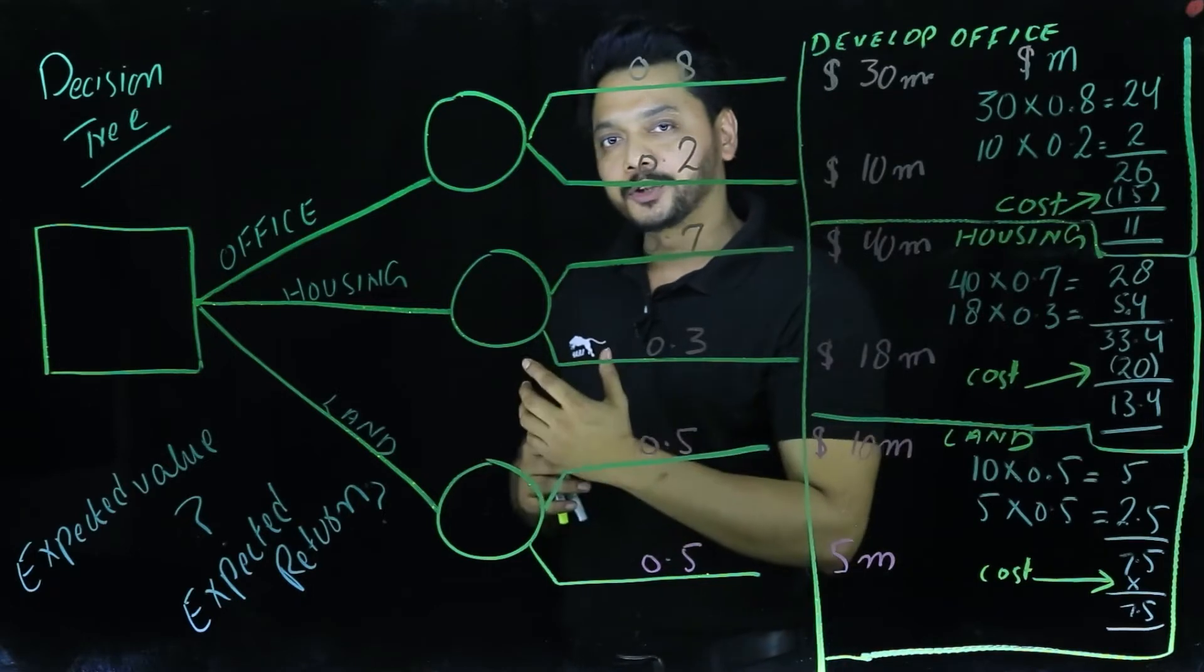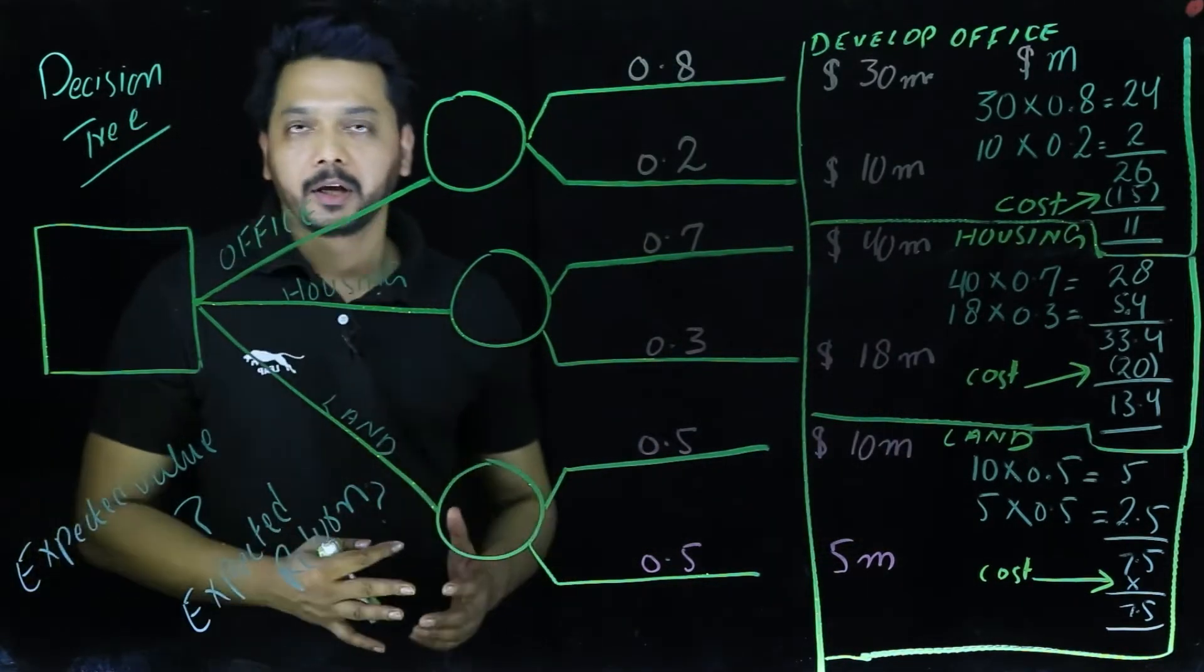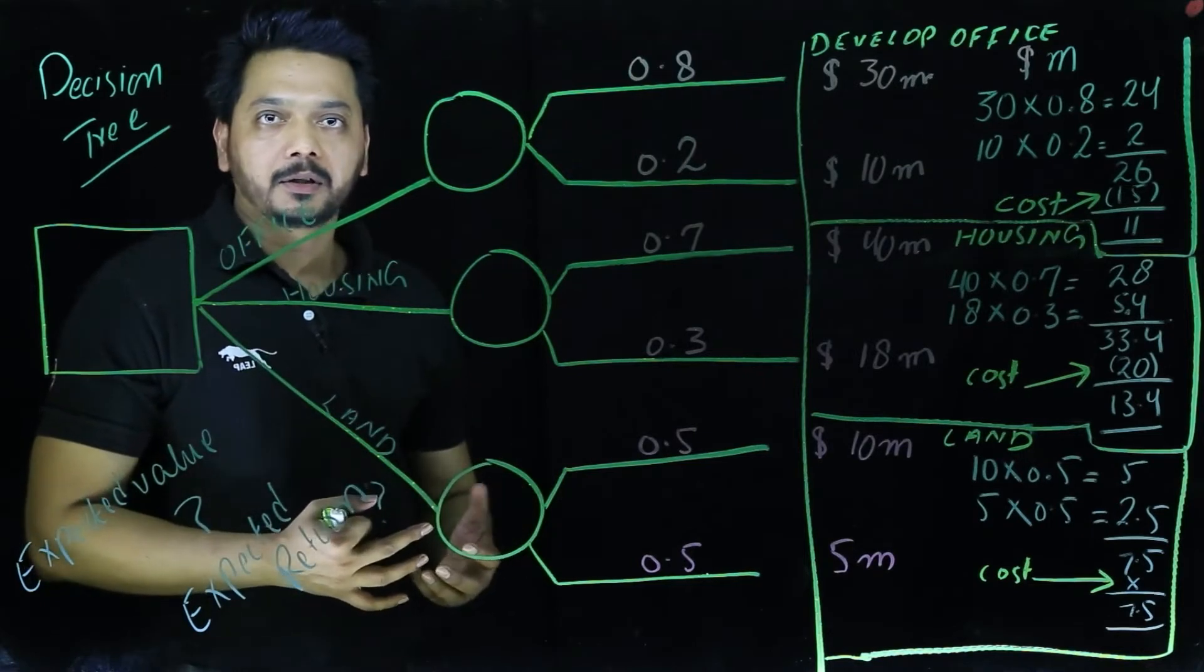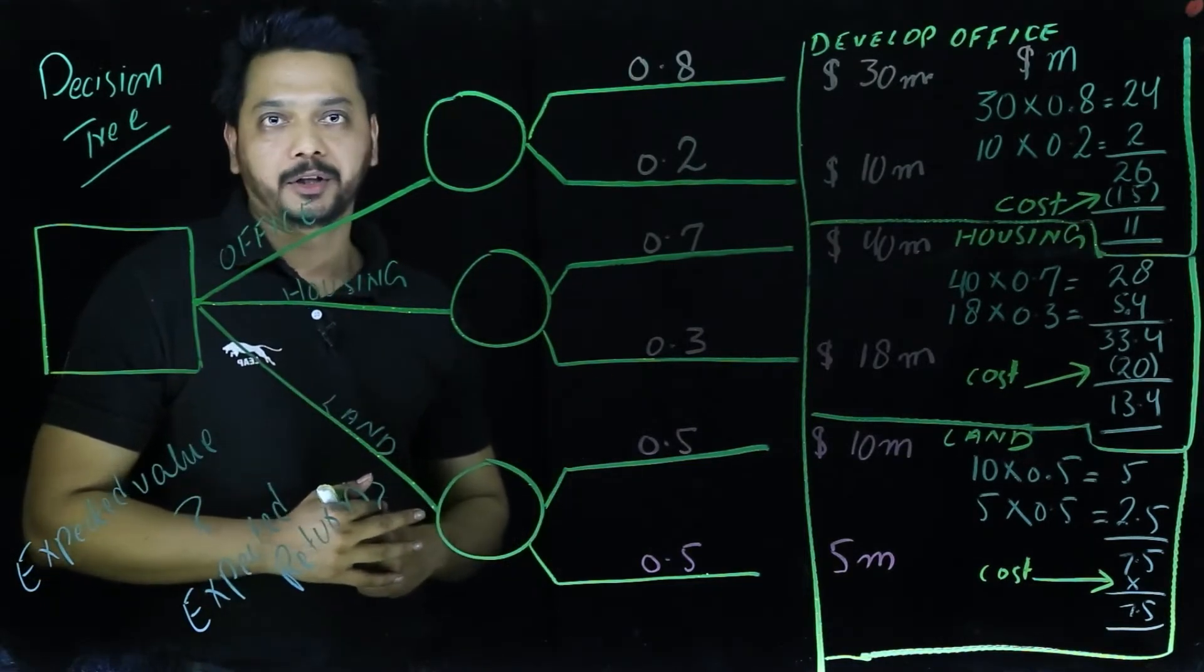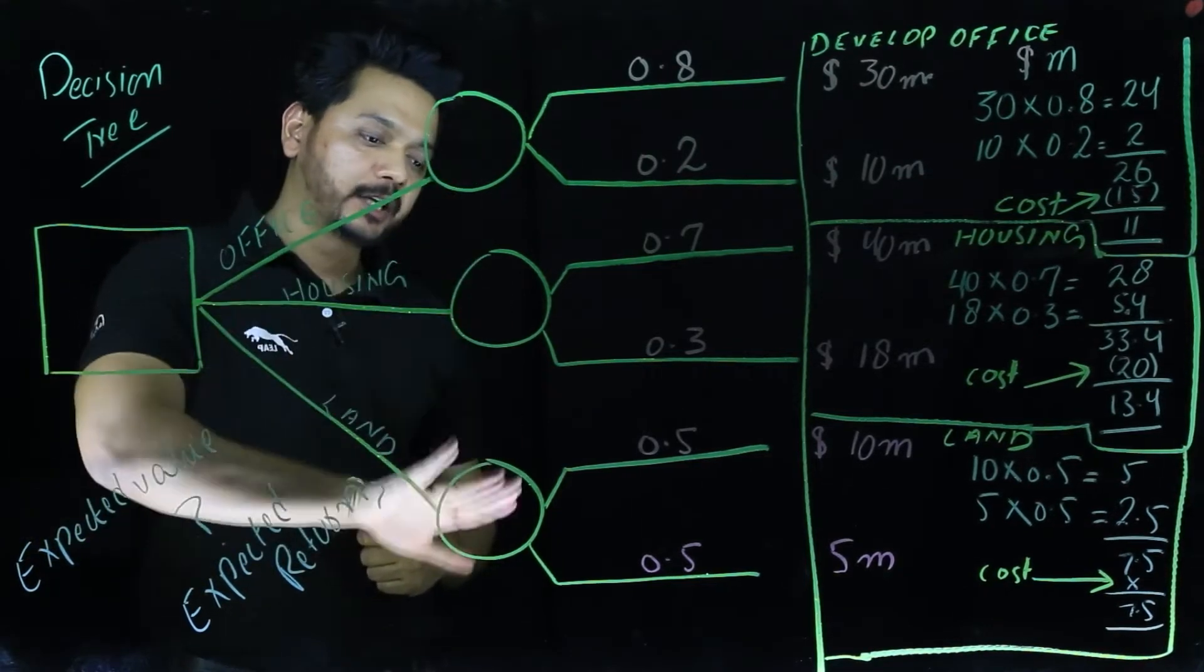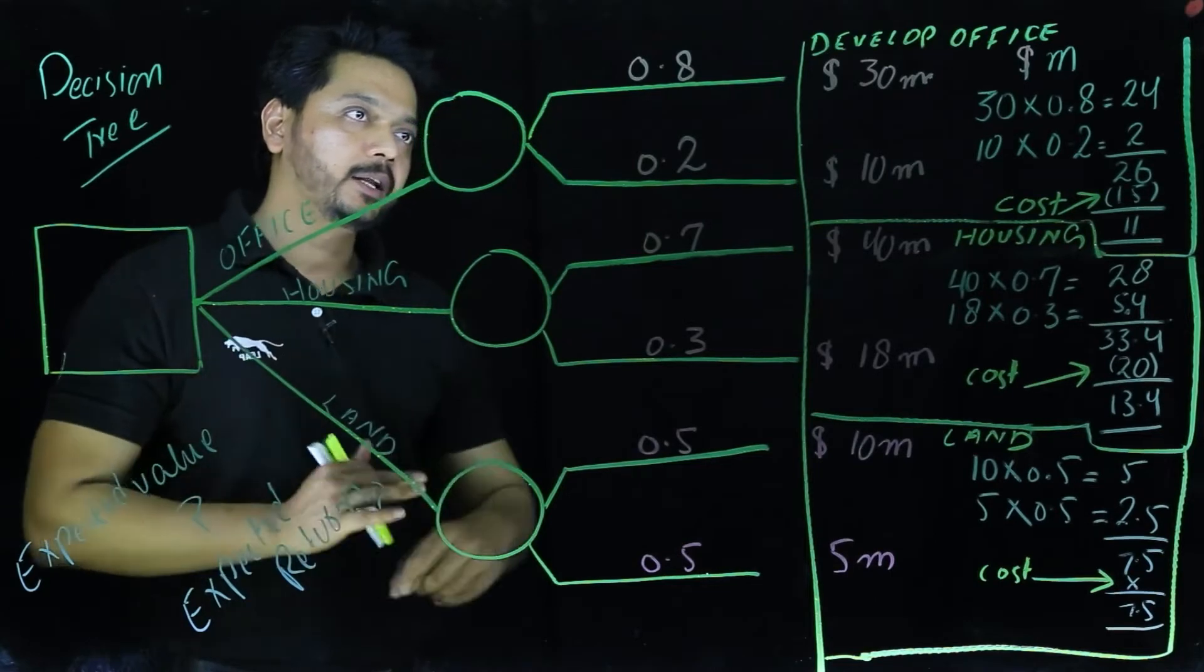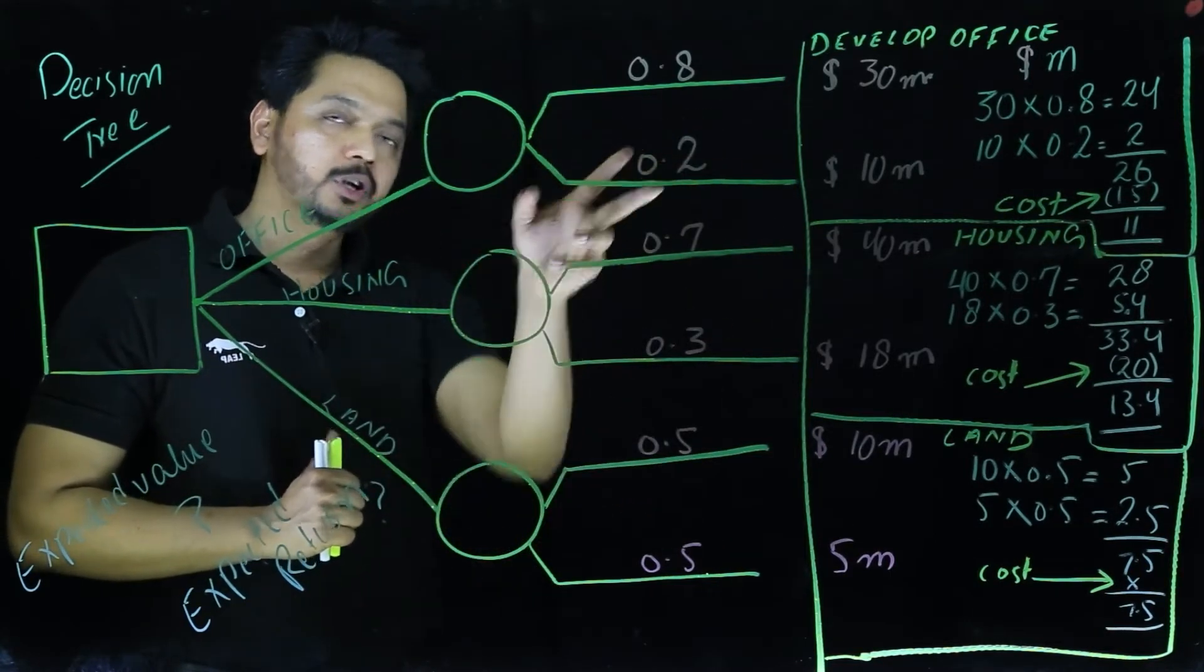So let's start the situation. If we start discussing the decision tree analysis, we need to understand the diagram here. You see, here we got a final decision node, these are the chance nodes, and then there are some outcomes. See, the branches have got the outcomes.